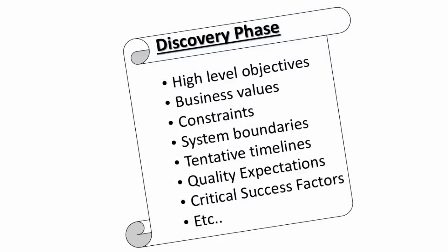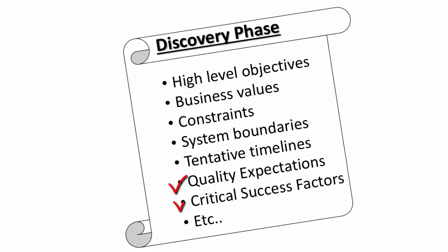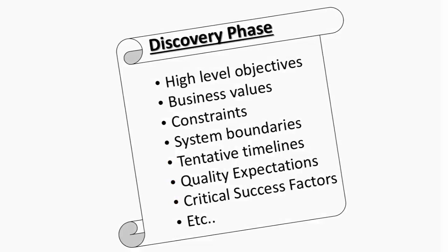Discovery is the initial part of Sprint Zero when the following things are discovered: high level objectives of the project, business value gain expected out of the solution, constraints with respect to the implementation, system boundaries to understand what is within and out of scope for development, timelines for the releases, and quality expectations and critical success factors.